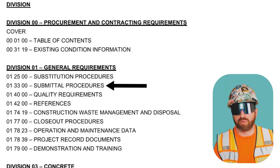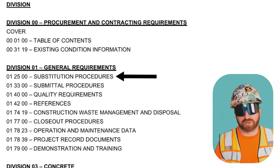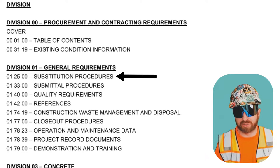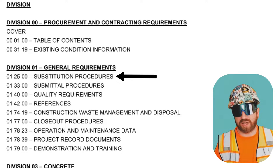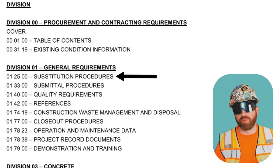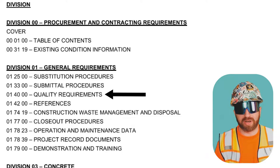Architects and engineers can approve or reject submittals if they are not in alignment with all of the specifications. Substitution procedures — as a contractor, you might not have access to a product due to market volatility or unavailability of some material. This section outlines the procedures for submitting on material outside of the required specifications for approval. Quality requirements — pretty self-explanatory.